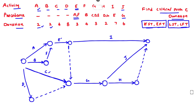Now we write the corresponding durations: A = 2, B = 2, F = 4, E = 3, C = 4, D = 8. Dummy activities have zero duration, so we put 0. Activity I = 7 days, J = 6 days, H = 2 days, and G = 3 days. The starting point is labeled 'Start' and the ending point is labeled 'End.'